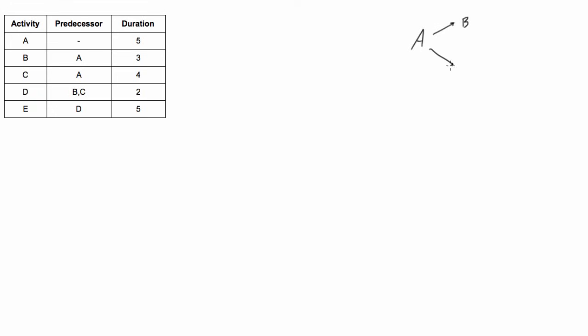So we would have activity B and activity C, and then we would have activity D can start once B and C are both done. So it's going to come back down into activity D, and then activity E can happen once activity D is done.